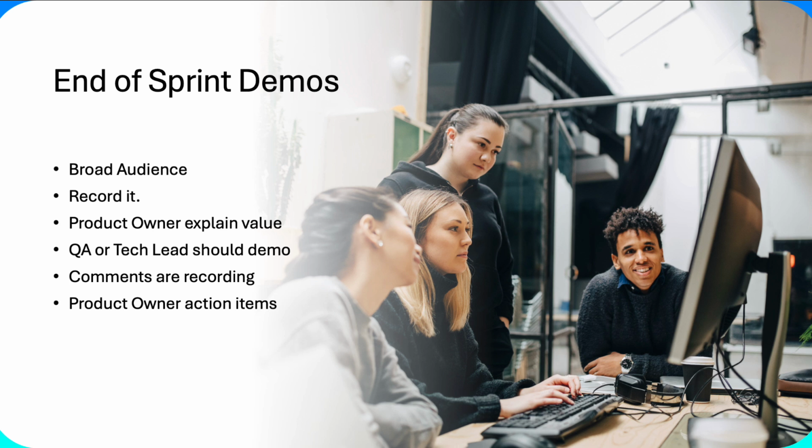And the way you run a good end of sprint demo is the product owner should start, and the product owner should explain why you're doing this. What's the customer problem? What's the proposed solution? Just very succinctly, it shouldn't take more than 20 seconds, and saying, hey, what we're doing here is we're helping patients find physicians online. What we did in this sprint is we allowed it to be able to do by distance and turn it over for the demo.